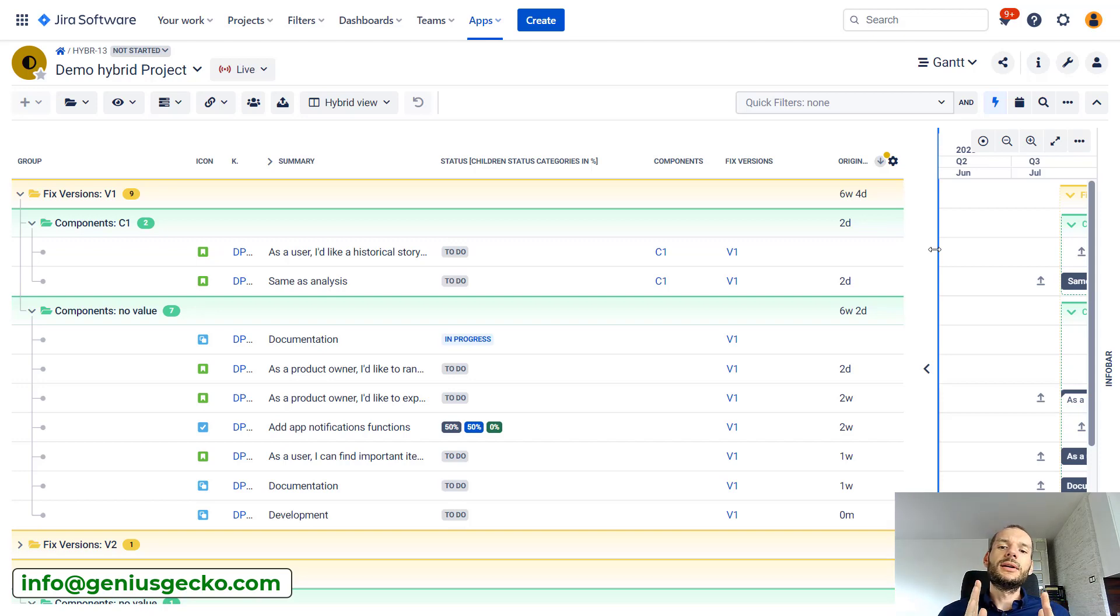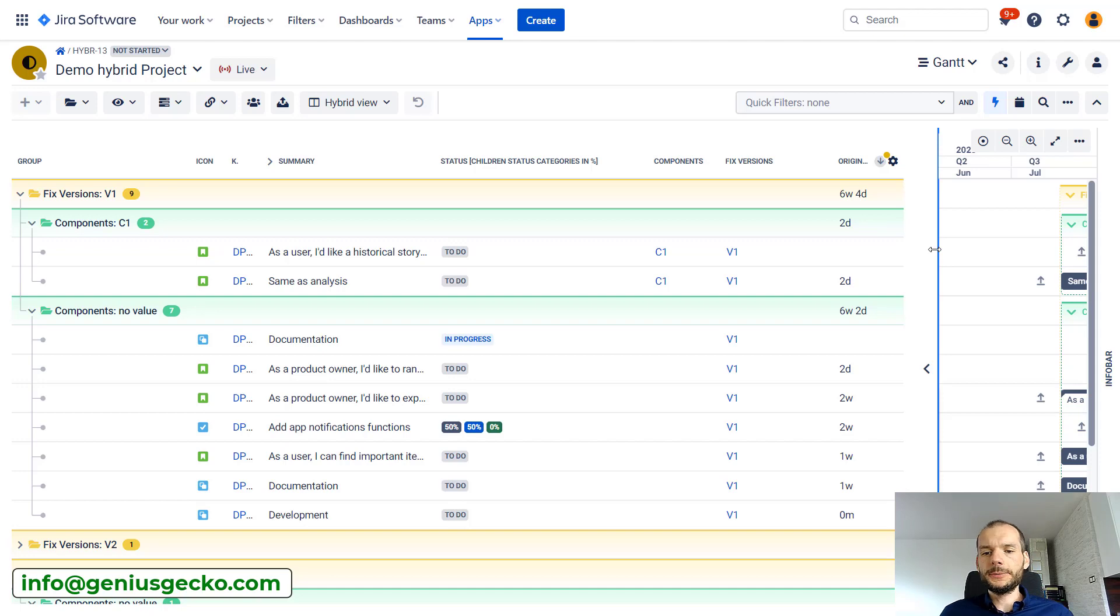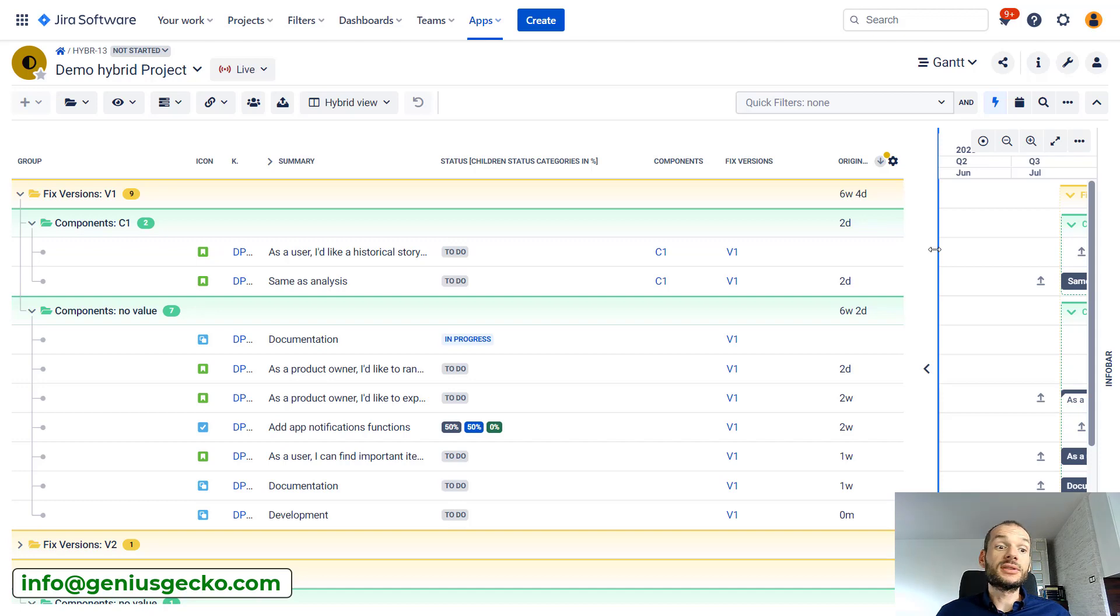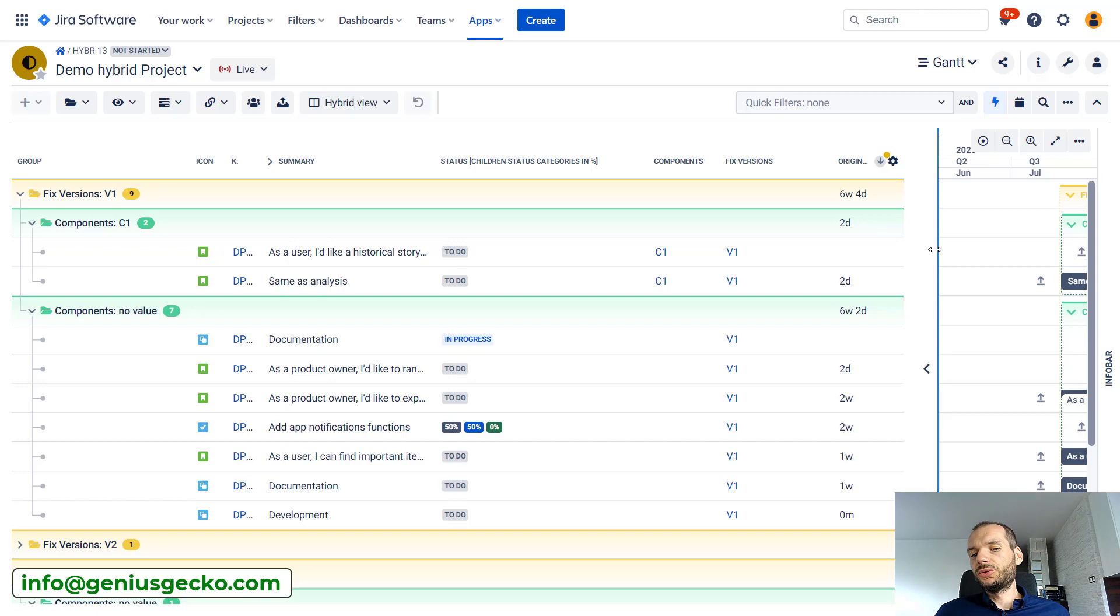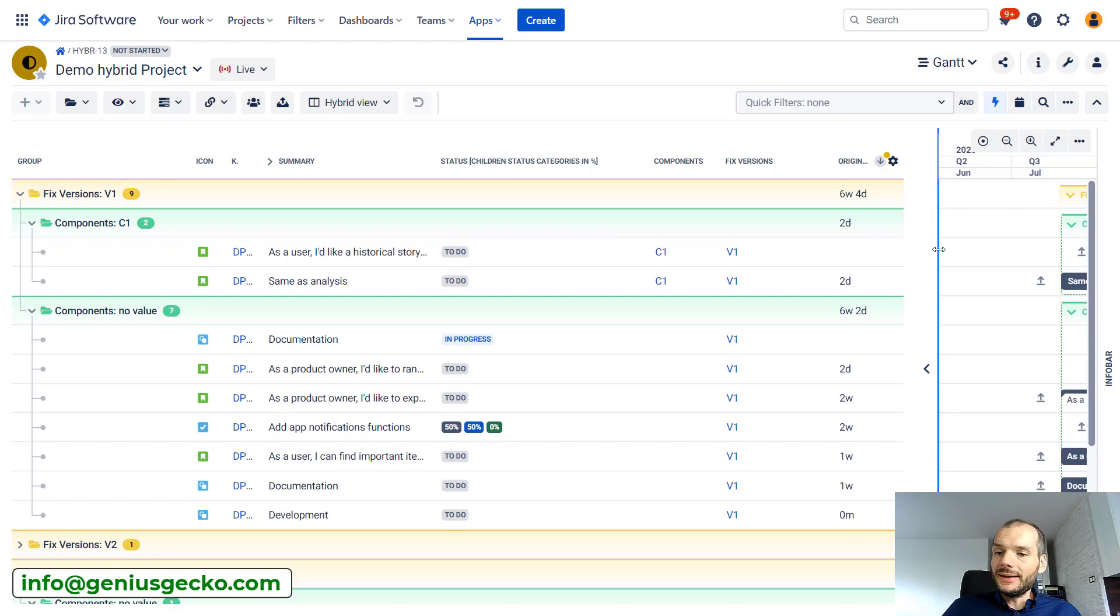If we want to see our data, our aggregations, from different perspectives than the standard work breakdown structure hierarchy. Actually, components or fixed versions grouping by those two is pretty common if you want to check how much work or how much time was spent to deliver those. Other grouping could be, for example, by assignee to see how much time a given person spent in the project.